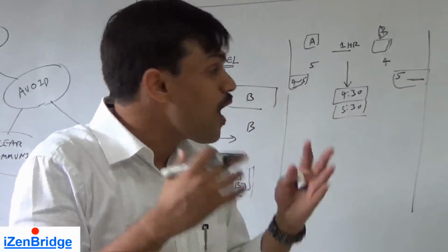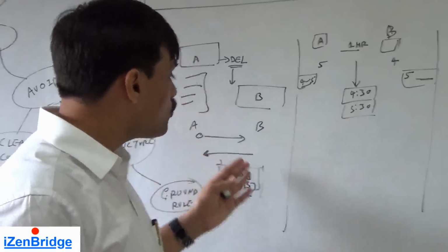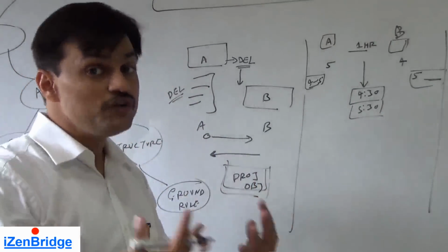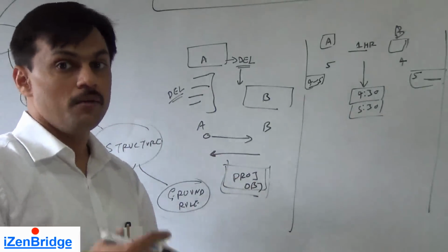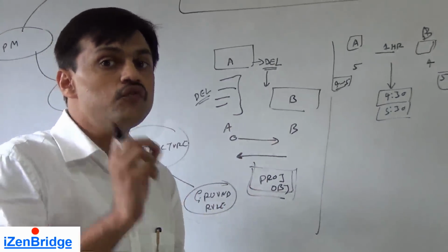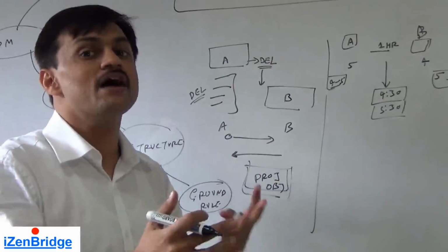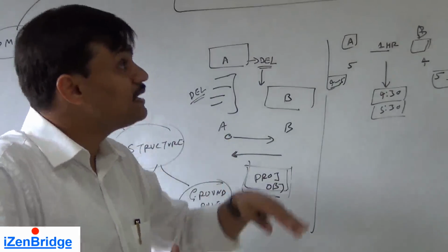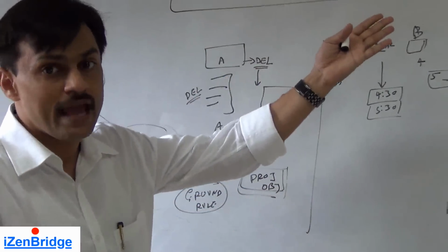We try to say, why are we doing this particular project? Both of you want that we achieve our project objective to the maximum extent. So by applying smoothing, we focus on the things where we have agreement, and we develop a trustworthy environment so that the second technique, collaboration, can happen.